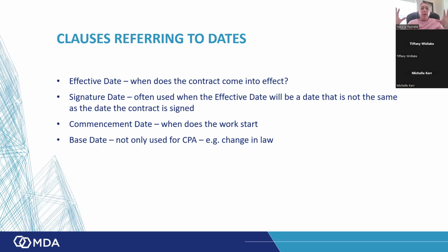So that's meaning when the actual agreement comes into effect between the parties, and there's rights and obligations that are set out in that contract. So it's quite important to understand when you're a contractor tendering for the works, how and when this contract becomes effective. For example, the JBCC contract just says the contract becomes effective when there's been an offer and acceptance. Doesn't refer to the signing of the contract. So when the contractor receives a letter of acceptance to his tender, that means the contract has become effective, and that would then be the effective date of the contract.